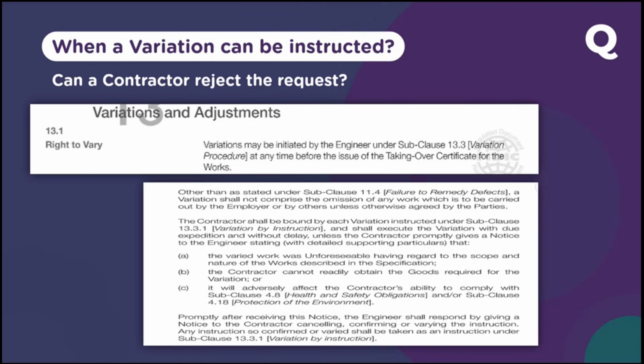So he is asking you to install a big chandelier. There is a podium, and in the podium he wants you to install a big chandelier, whereas the contract is about to complete. The time of completion is only 3 months balance. But he is sending a request telling you have to install a chandelier also. A special chandelier is a long lead item actually. You may need 6 months to manufacture it, and 1 month to deliver also.